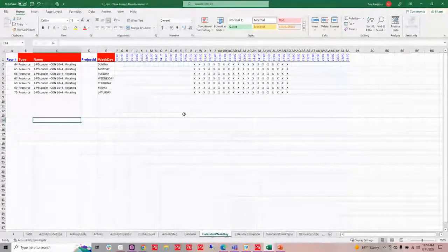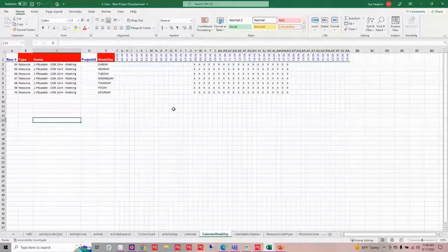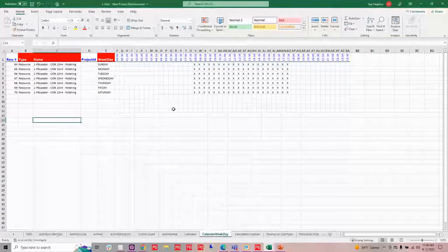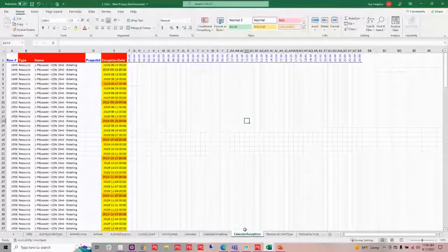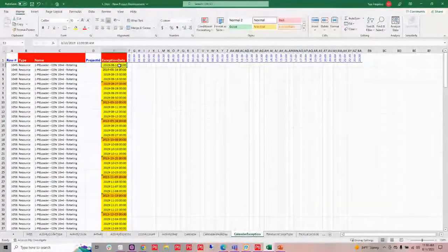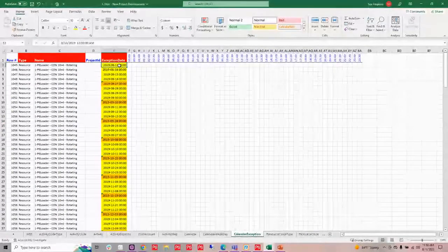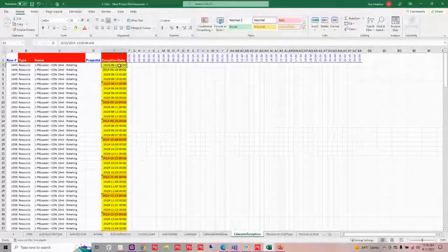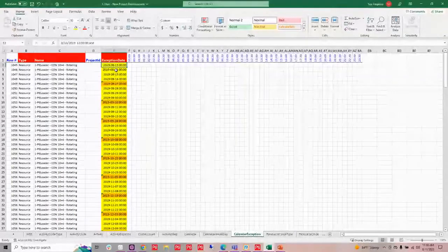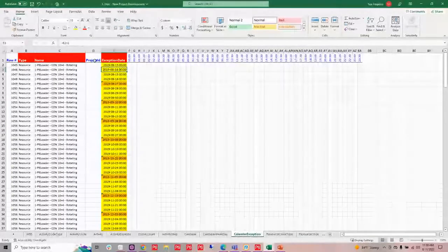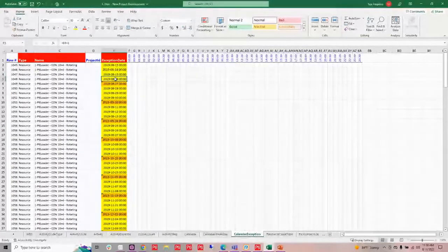I can mark the days of the week and the hours during the day that are going to be work hours. And then I can do my exceptions a lot easier in Excel than I can by counting in P6 to decide which are exceptions. So I've put in my first date, and then I've used a formula to fill down my next 4.